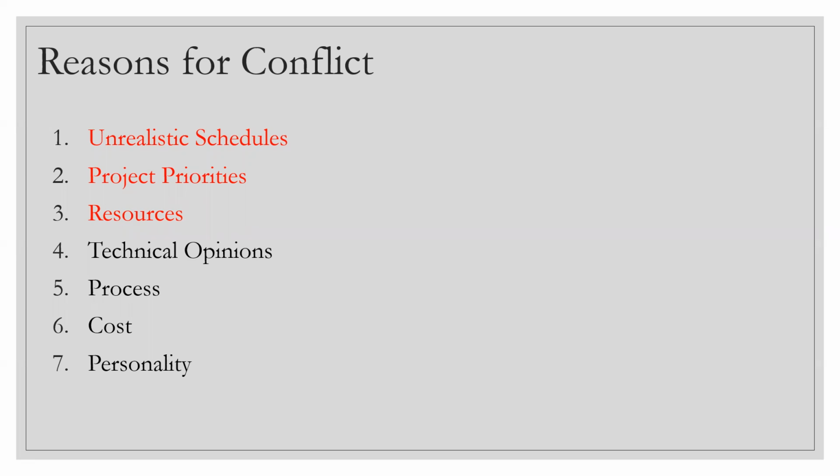at one shot. And that's where the project managers, the moment they know that they are being aligned to a project, the first thing they will probably do is reach out to the build team and say, okay, I will be approximately needing 4 or 5 people from your team from this time to this time. So everybody kind of psyches out, and they want to get the resources on their plate first. And then there are choices, like I need to have a SME, or I need a senior resource from your team, because the project is far too large and complex to be handled by a junior resource or a newbie.